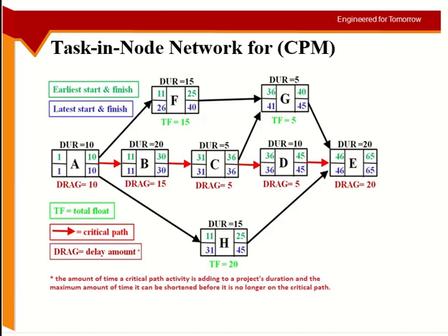Then you have free float as well. It was shown in the slide. It's not written here, but since we are going through this topic, let me explain it. Free float is the difference between these two times, which are at the end of the arrows. So free float for activity F will be 36 minus 25.